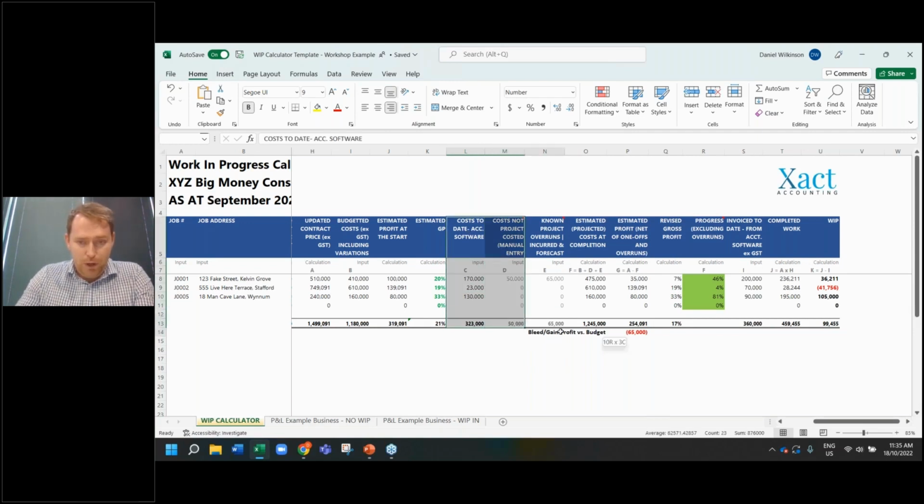The big bit with WIP is that you really need to quantify where you're either saving money to quote or where you're tearing up money to your quote. Say you have in your quote a nice retaining wall. It should have cost you 10 grand all in to land it. With my CFO advisory hat on, if you're spending 10 grand on the retaining wall, who cares? Move on, you've hit your budget. But if it's coming at 12 grand, you've cooked 2K of that profit. Now you're set to make 90 out. You want to capture the overruns and underruns throughout as we go, because you don't want to artificially inflate the WIP. If you have an overrun here, there's no revenue associated with that.